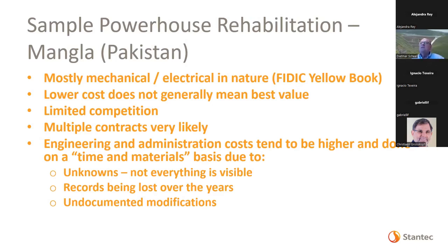If you award it to a single contractor, however, you don't always get the best equipment in all the different areas. And because there's so much value in the powerhouse itself, you do want that greater oversight.